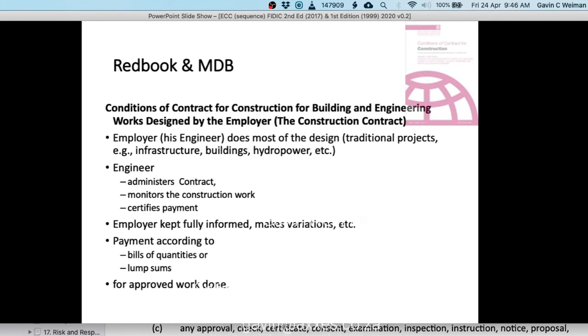Or it could be a lump sum contract, and a lump sum contract would normally break the work down into tasks or activities, a sort of work breakdown structure approach. It could be a single activity or a group of activities, like the activity foundations could consist of a group of activities like dig, place the reinforced bar, test the concrete, pour the concrete, dry the concrete.